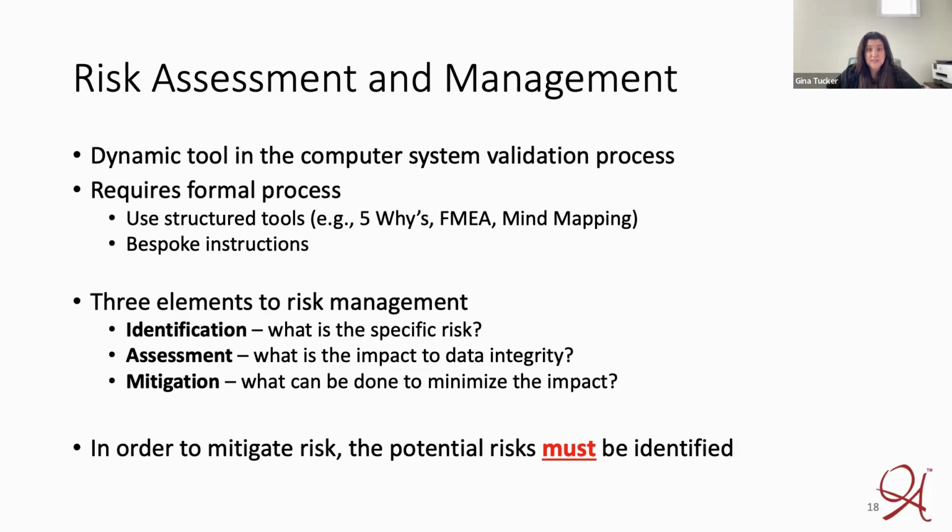OECD advisory document number 17 discusses risk management, and it says that risk management should be applied throughout the life cycle of a computerized system, taking into account the need to ensure data integrity and quality of study results. OECD goes on to further say that risk assessment should be used to develop an adequate validation strategy and to scale your validation efforts, and that validation effort should be driven by intended use of the system and the potential risks. So it makes a logical flow. OECD also states that if your risk assessment outcomes are appropriately used, they will provide TFM, or testing facility management, with an adequate methodology for both the validation of simple laboratory systems as well as complex data management systems.